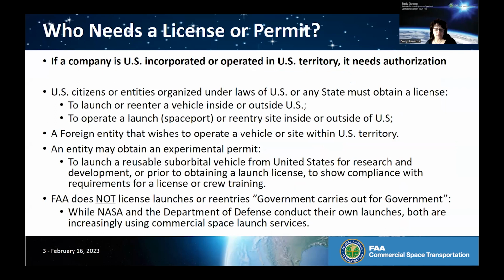Who needs a license or a permit? If a company is United States incorporated or operated in U.S. territory, it needs an authorization. That means U.S. citizens or entities organized under the laws of the United States or any state must obtain a license to launch or reenter a vehicle inside or outside the United States, and to operate a launch, spaceport, or reentry site, inside or outside of the United States.